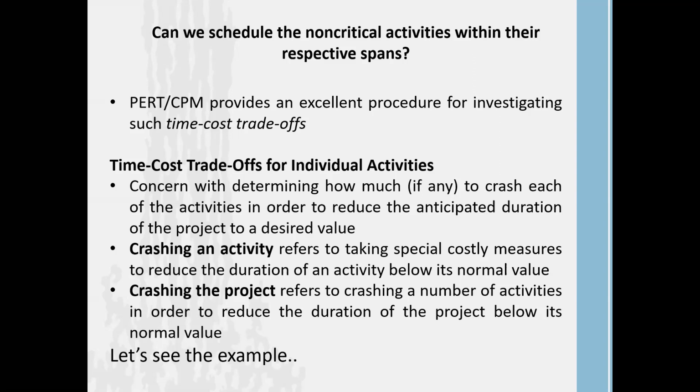We know that when we try to reduce the project completion time, we have to incur additional cost, right? Might be hiring more laborers, might be hiring machines, might be the number of labor hours going to be increased. There are several techniques we can use, but here we need to be very careful. We have to find out which activities we can expedite, specifically these non-critical activities, and in which cost-effective way we can expedite the project.